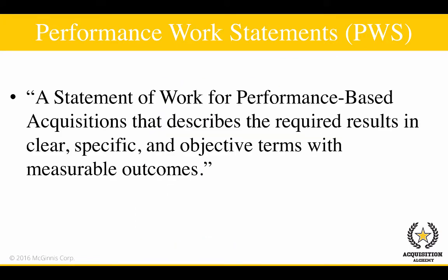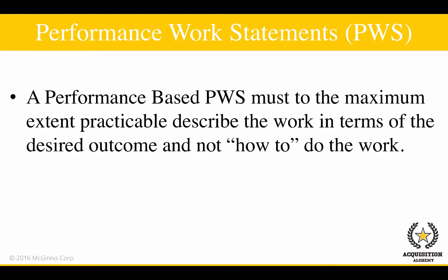Performance work statements are defined as a statement of work for performance-based acquisitions that describes the required results in clear, specific, and objective terms with measurable outcomes. Performance-based performance work statements must, to the maximum extent practicable, describe the work in terms of the desired outcome and not how to do the work.